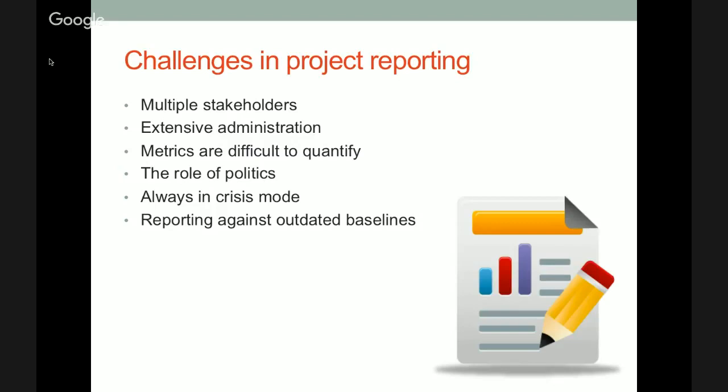So it's really challenging in reporting to be able to predict those things because there are so many pieces and they're moving so quickly. And sometimes it's also because you're reporting against outdated baselines. Maybe at the beginning of the project, you determined that things were going to go a certain way. And when you get there, that baseline doesn't make sense anymore because the scope has changed, the project has changed.